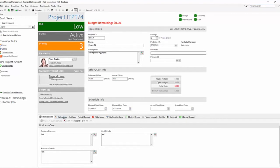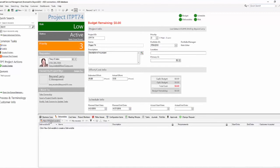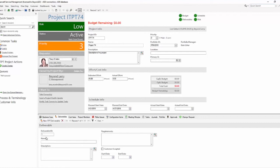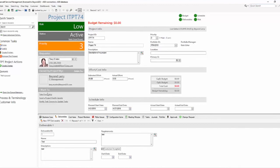You'll set your business case. For your deliverables, you can come in here and set a new deliverable. Give it an ID, maybe you have ID 1, maybe you have ITPT 74-1 to show that the deliverable is matched against this project. What is the name of that deliverable? What's its description? What are the requirements? And whether or not the customer has accepted that deliverable. You can have a start and end date with it. You can just keep adding deliverables as needed so that you can keep track of everything that is in process here.